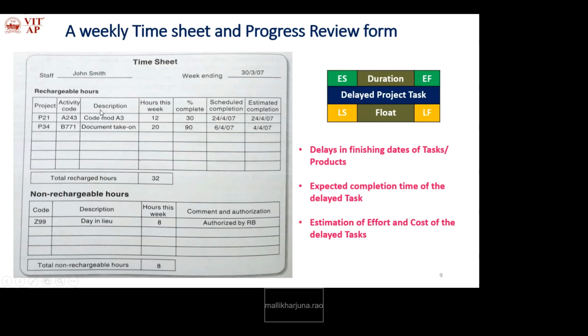Then the description of that, whether it exists in development, analysis or design, the stage of that activity, and the hours allotted for this week. Extra hours, the percentage completed, the scheduled time of completion, and the estimated time of completion for extra hours, rechargeable hours for the extra schedule. This way we have to estimate for all.